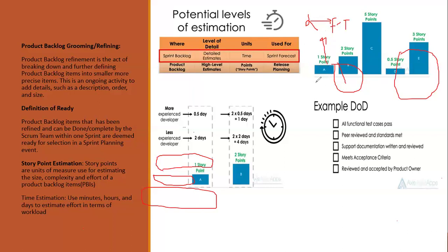Let's assume this is a login page. Of course, for a login page, you need to design the design widget and all that. The designer will say, well, it will take me 2 hours, it will take me 5 hours to do my part there. So that is the original estimate. Then the front end guy will say, it will take me 2 hours to implement this design. Then the tester will say, it will take me 2 hours to test everything that they have done.